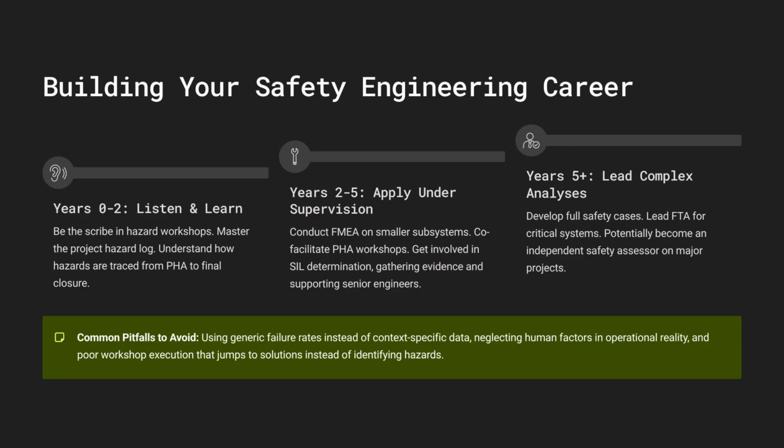Learn how to read it, how to update it correctly, how to trace a hazard from its initial identification in PHA right through to its final closure and verification. Master the database and the language.